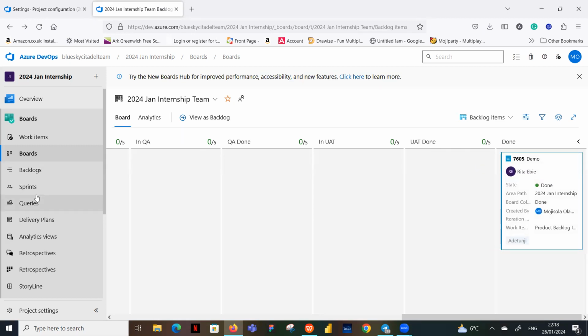That means one task is open, and that task you're not sure if it has been done or not. Except if you go into the sprint, look at the person that owns that task, and then reach out to that person. Oh, Adetunji, I noticed that your automation task is still in progress. You say, oh, sorry, I finished working on it, I just forgot to take it to done, and then the Scrum Master can close it. And what you're doing is to ensure that by the time this story gets to done, it has met the definition of done. Now, don't ask me what's the definition of done. That's another thing you're going to get to work on during the sprint.